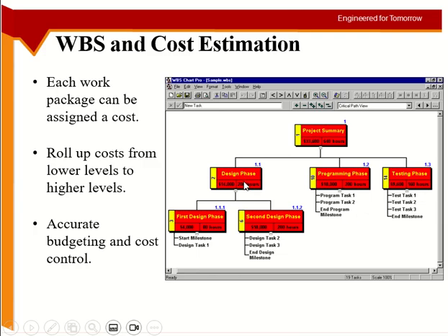Especially the cost, we will talk about duration later on as well, but for the cost it is confirmed that the cost of this activity will be this plus this. If you have anything more, then you will add those as well. So 10 from here, 10 from here, total 14,000.